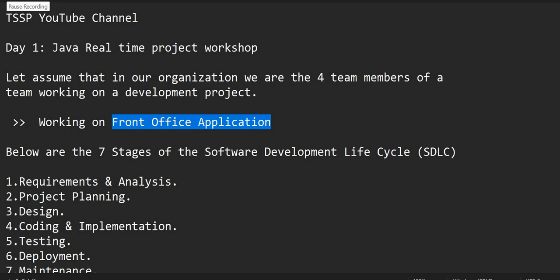Also, based on the technology you are using, you come up with the complexity and learning curve for the implementation, and we arrive at an accurate story point. One story point is 8 hours. Let's take 4 days as 4 story points, 3 days as 3 story points. That way stories get assigned points, and they will be moved to the current sprint.